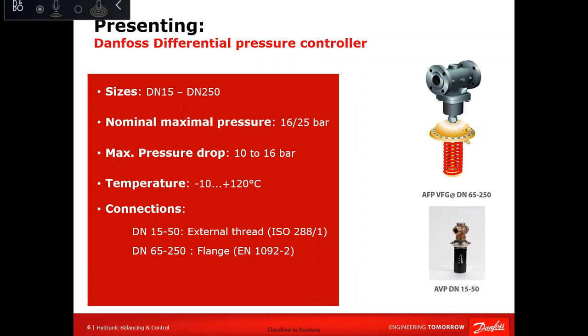And once you hand over the project, you as consultant or installer will leave the site. Then who will be responsible is the operation team and the owner, who will not know what criteria you put as an installer or a consultant to match the system requirement. For that reason only, this DPCV started to be used in shopping malls and shell and core projects.